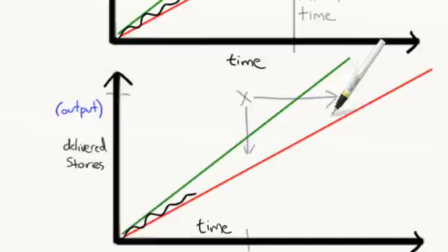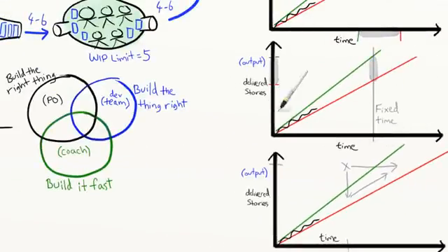It's generally better to reduce scope than to extend time, because if we reduce scope first, we still have the option to extend the time later and add the rest of the stories. Vice versa doesn't work, because darn it, we can't turn the clock backwards. You know, time is rather annoying that way, isn't it? So Pat puts it this way. We could deliver something here and the rest later, or we could deliver nothing here and the rest later. Which do you prefer? These calculations are pretty simple to do, so Pat updates the forecast every week.